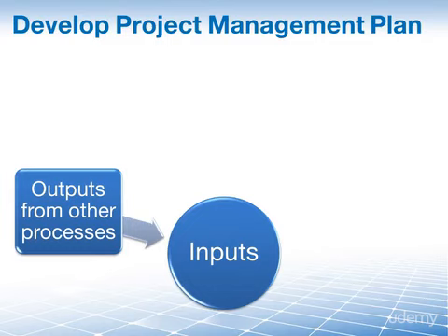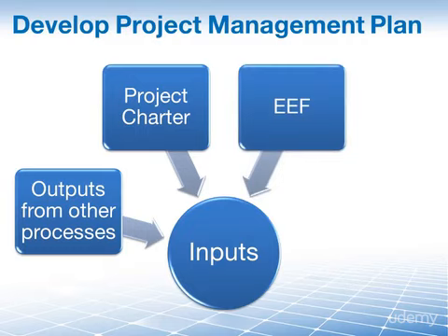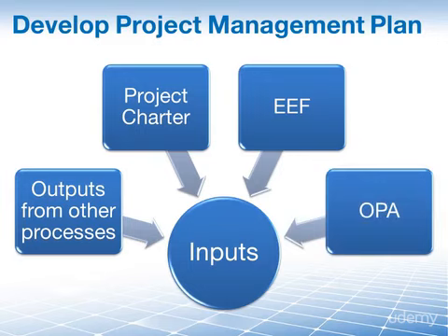Well, the project charter is another input, and it brings in the high-level boundaries and project purpose, and how the plan is developed is also influenced by the enterprise environmental factors, as well as the organizational process assets that are used in our organization. So as you can see, outputs from many of the other processes are integrated in this process, the Develop Project Management Plan process, to create our overall project management plan.